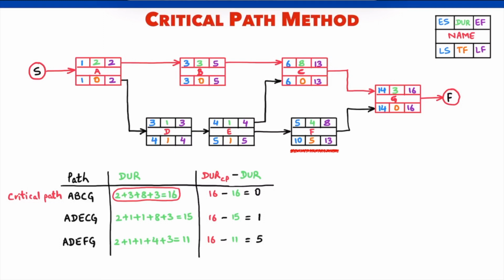If the early start of F is delayed by 5 days to day 10, the early finish of F is also delayed by 5 days to day 13. The early start of G remains the same, day 14, the next day after the early finish of F. We cannot delay the early start of F any further. Free float of activity F is 5 days.